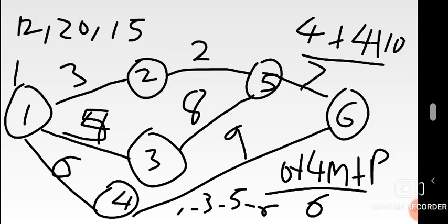What would you do in that scenario? What you're required to do is apply some knowledge from statistics, specifically knowledge under normal distribution. I'll illustrate with the same example. You have done part A and part B, and they ask another question: what is the probability that this project can take 22 days? But here it has been determined that the maximum is 20 from our critical path determination.